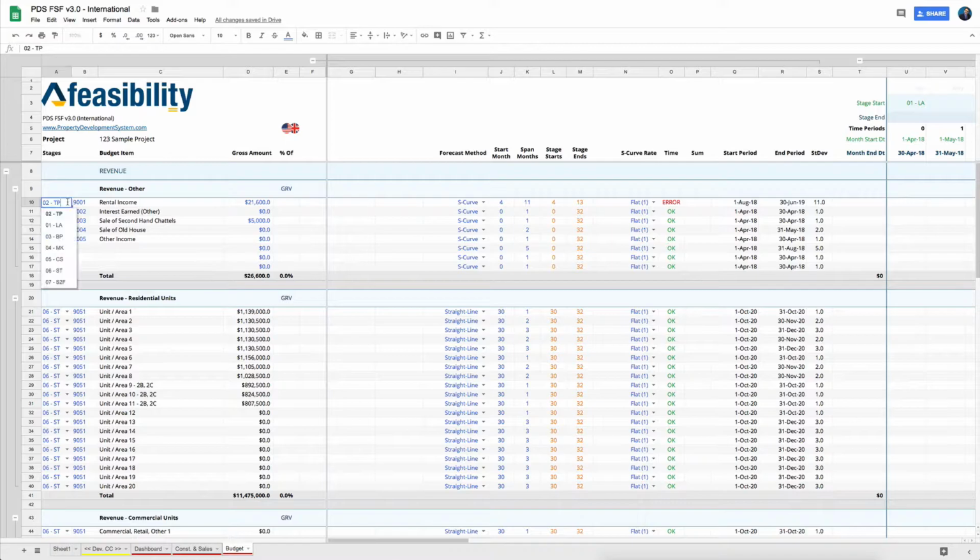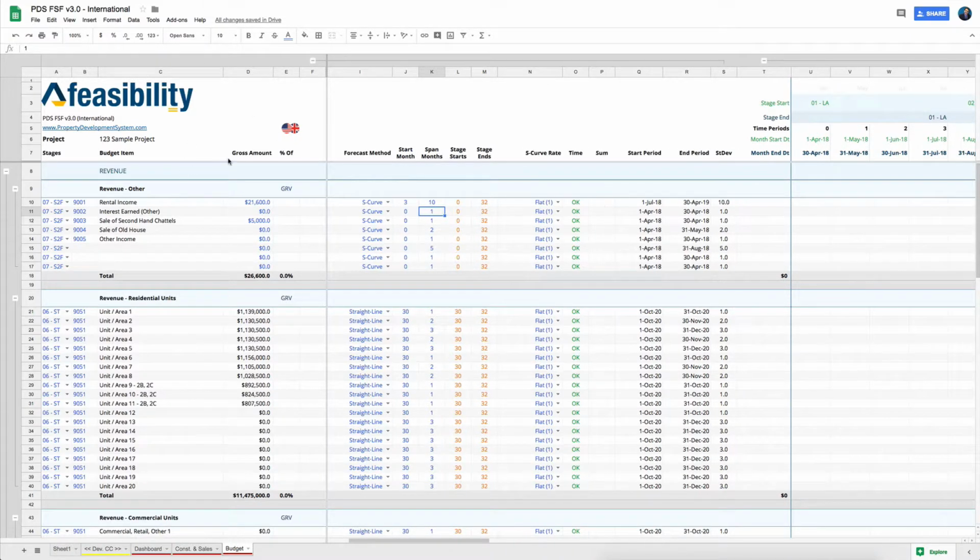So now in this scenario, that's why for these kind of costs, I actually leave it to start to finish. That way I can actually make it start the day I want. So when I come in here, I can override this. All this is telling me that it's linked to this, so by default it's telling me that's there. But because it's blue, I have this option to come in and override this section and say no, it'll probably start in the third month, and from the third month I'll rent it out for 10 months. That way I would know, when the costs actually get calculated, or when I press my update values, these costs get calculated over here.